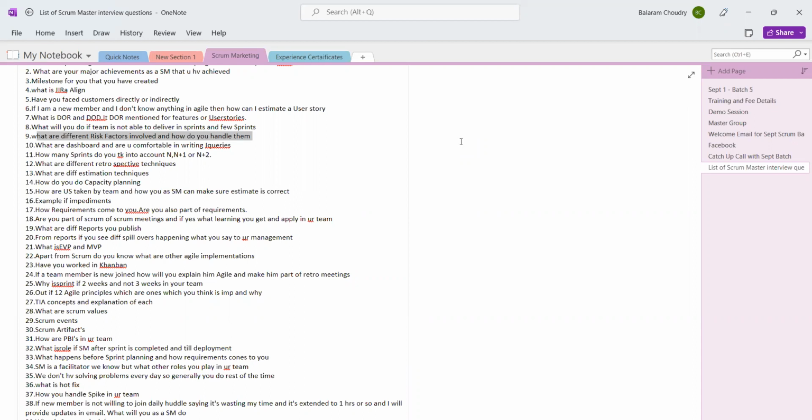Means all the commitments and all the dependencies have to be committed. There should be a commitment from the dependency team, and there should be sufficient understanding among the members. And if vendors are involved, or if any technical backup is needed, let's say test data provisioning, or any access related issues, all these factors together pose a risk for the delivery of an item, right? Now, how do we handle it? We have to mitigate these things by making sure all the loopholes are plugged.